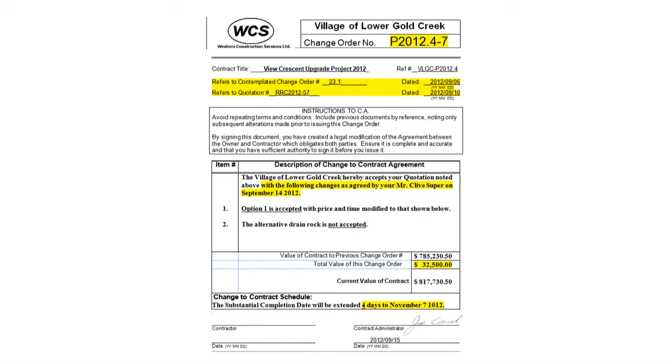Sometimes negotiations are formalized with an exchange of paper, but often the agreement is just done on a handshake with the change order left to formalize it. If the agreement was put on paper, then refer to that document in the change order also. If the agreement was informal, then document the agreed terms and the date of the agreement in the change order.